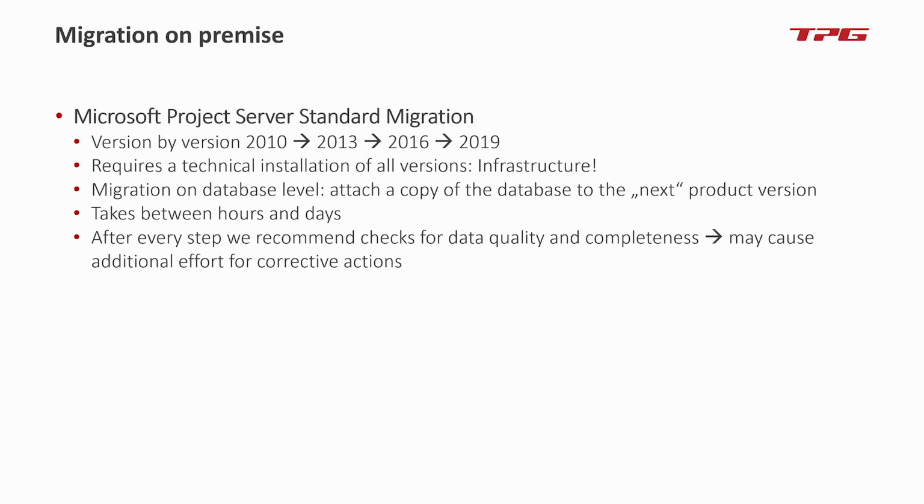Then we do some functional check in the new system. Can I still open and create new projects? Can I still publish them? Does the time tracking work and so on? Do I have my old timesheet data? Can I still access them, for example? So this is definitely something that is needed in these different steps in between.